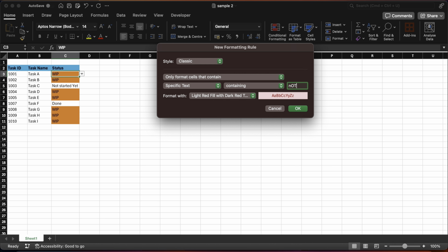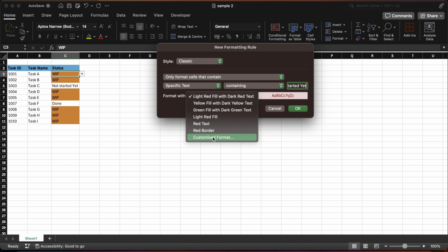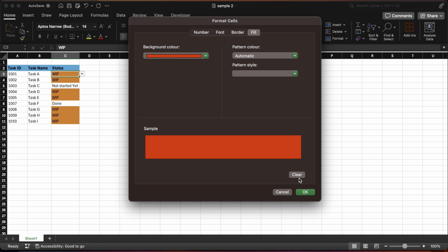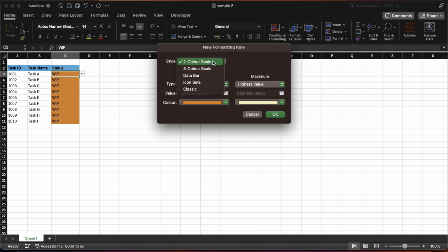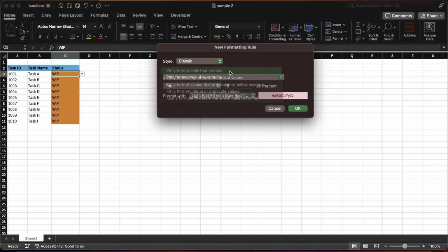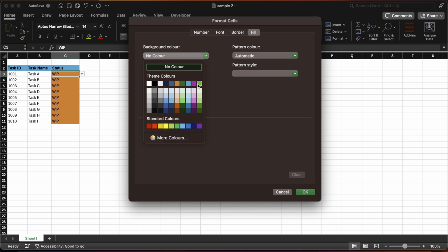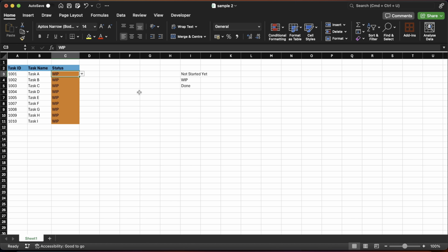Some benefits of using this RAG status in your project management are that, since it has different colors on it, it enhances visibility, provides a clear visual representation of project health, and it also proactively helps you identify and mitigate risks early. The third thing is focus. It enables better resource allocation and prioritization. Where you have not started yet as a status, you can give more attention to that and see why it is not starting. Things like that, it helps you to track.